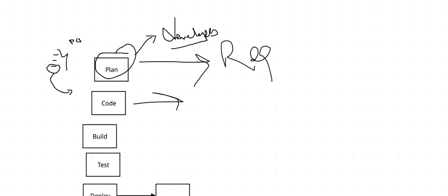Not only for planning, it is also for tracking. For tracking, for example, if this task is going for code, which is exactly the development, and when they do the development, they get blocked, for example, this person needs some access to another system and that is blocked. So every day they will have a stand up where, okay, this is the block, you put this task in pending, let's work on another task. So we usually call this an issue tracker as well.